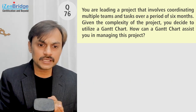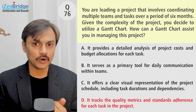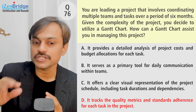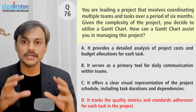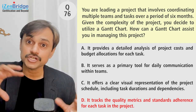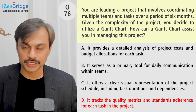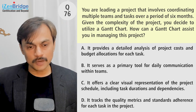Option D: it tracks the quality metrics and standard adherence for each task in the project. The utility of a Gantt chart is not for tracking quality metrics. The utility of a Gantt chart is basically looking at the relationship between activities and sequencing them so we can see how our critical path overall looks.